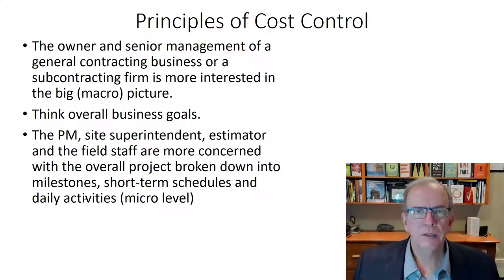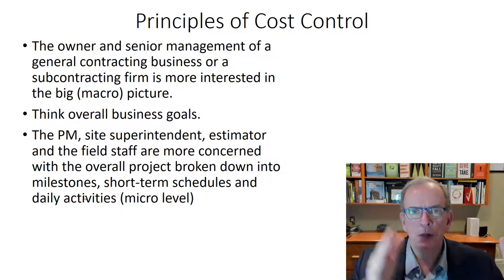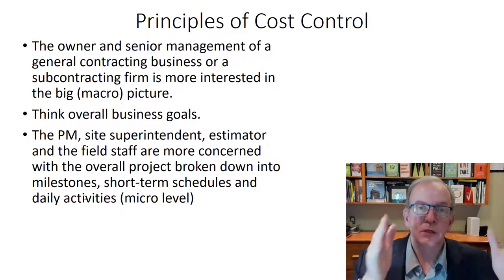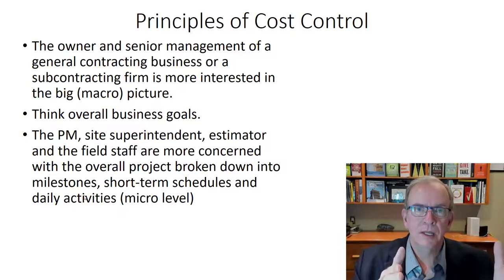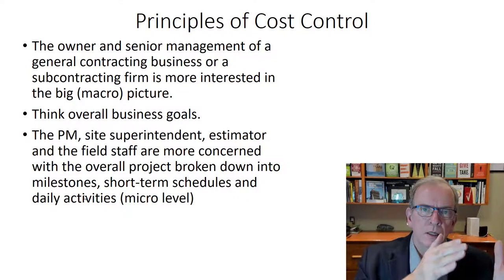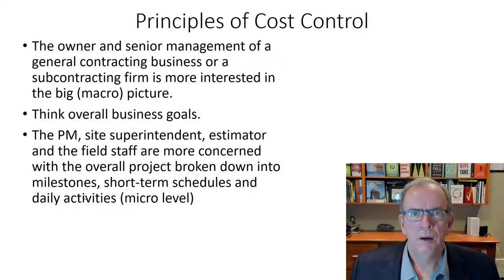For the substructure, we've got to do it in the next 6 months to meet what we plan to get done in the 2 years for the whole project. If we've got to do that in the next 6 months, what do we have to do in the next 3 months, the next month, the next week, the next day, today? So this is basically how we break things down.